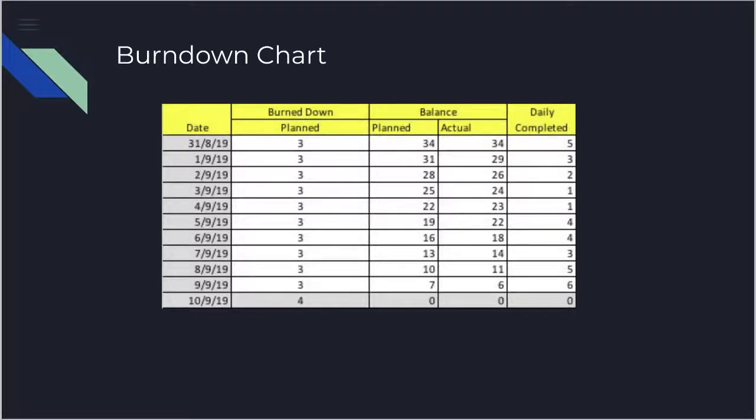In the following slide, you can see how the burn down chart was assigned. Each day was given 3 hours to work this task from the beginning of the project. We fell short earlier on, however we worked on the task more often and more consistently when the Sprint 1 due date approached.